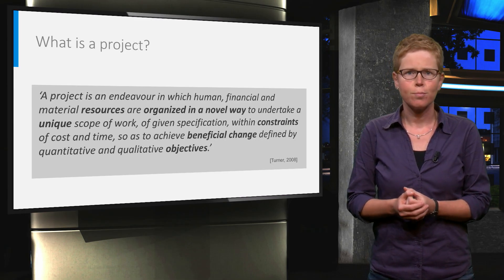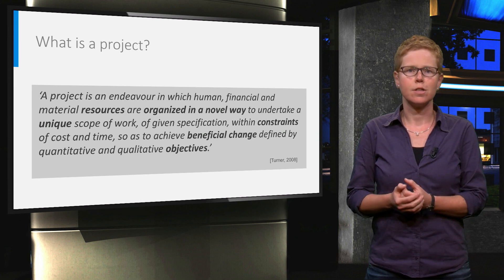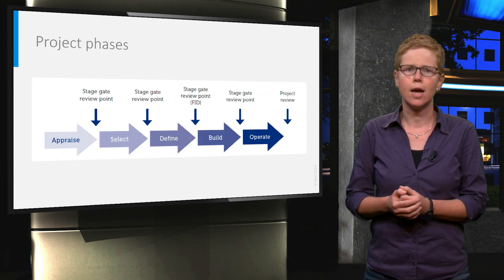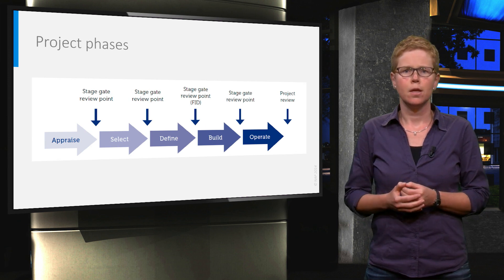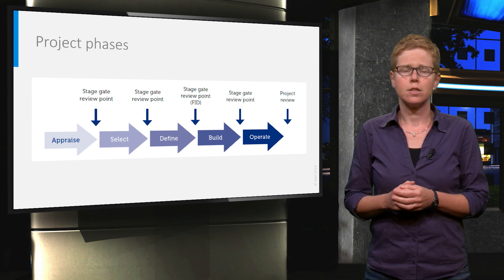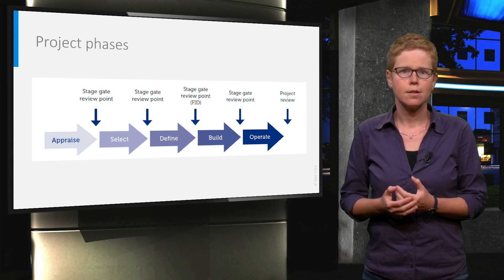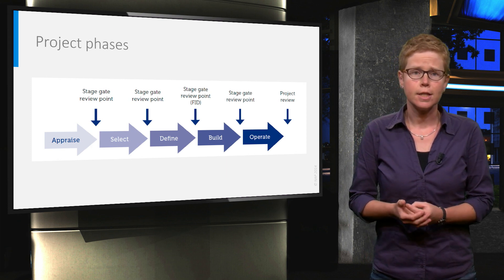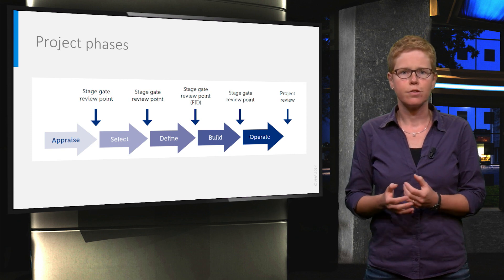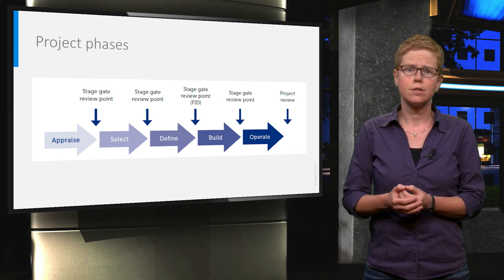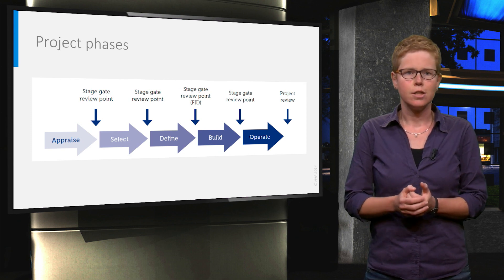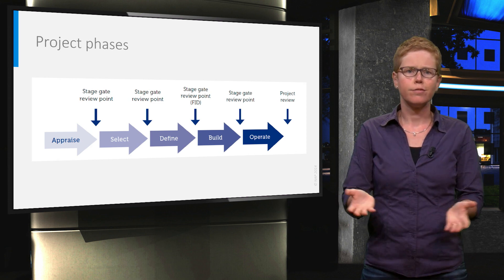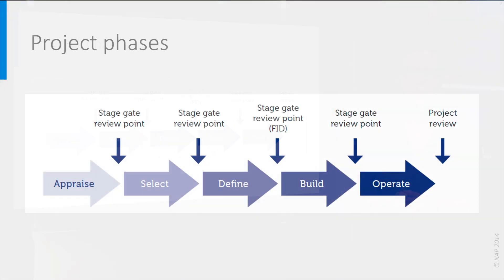Whatever the unique character of a project is, it will always have a number of distinct phases. A typical project life cycle consists of several phases. In the first phase, a potential future project is identified, the potential value is assessed and the alignment with the business strategy is verified. In the second phase, different options are investigated and a preferred solution is selected. In the third phase, the project is defined in more detail and funding needs to be obtained. These three phases together — appraise, select and define — are called the front-end development phase of a project.